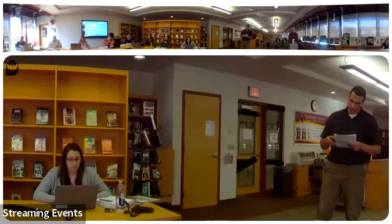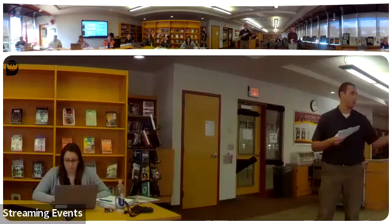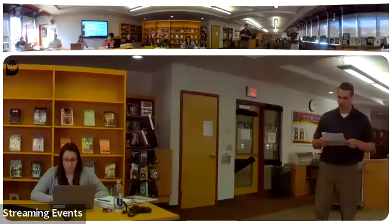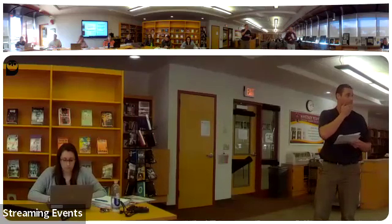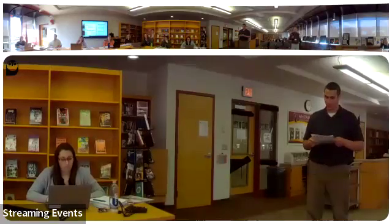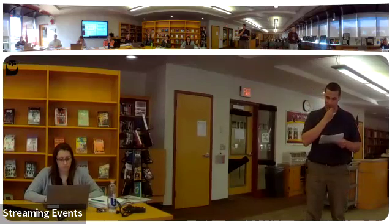In terms of the TRA ceiling modifications, this is one that we reviewed with. We were gonna enhance the design of the 3rd floor ceiling. We sent out some pricing. After a couple of iterations, we determined it was probably not the most cost-effective thing to do at this time within the project. So we kind of pivoted and gone back to the original design.